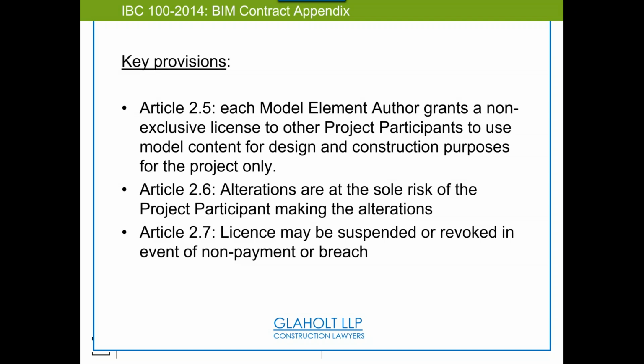And more close to home for me, walls and doors. I have the door located and the concrete forming is being done, and they move the formwork, and they say, well, great, now just move the door. Wait a minute, I can't, because now it won't be barrier-free access, and it'll be a code violation, and we have all that back and forth. 2.6 says you move that formwork back or there's an error. I'm dwelling on that a bit, but it is very important because that's the issue.